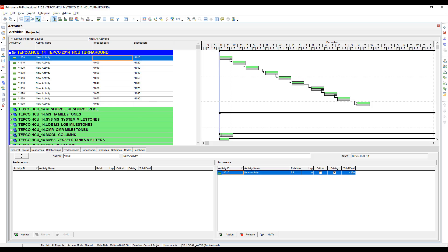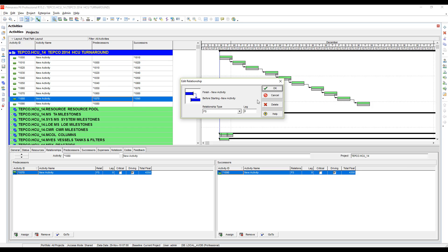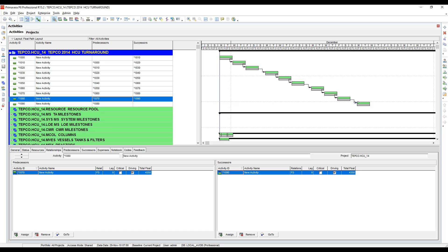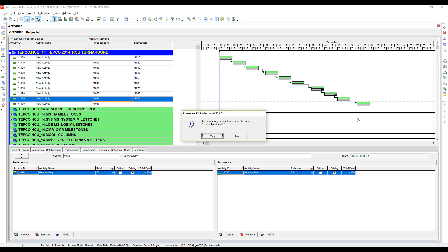You can also double-click on a relationship line out in the Gantt chart and hit the delete button when the edit relationships window comes up. You can also click on the relationship and it'll turn blue, so just single-click on it, don't double-click on it, and you can hit delete on your keyboard and it'll ask you if you're sure you want to delete it.